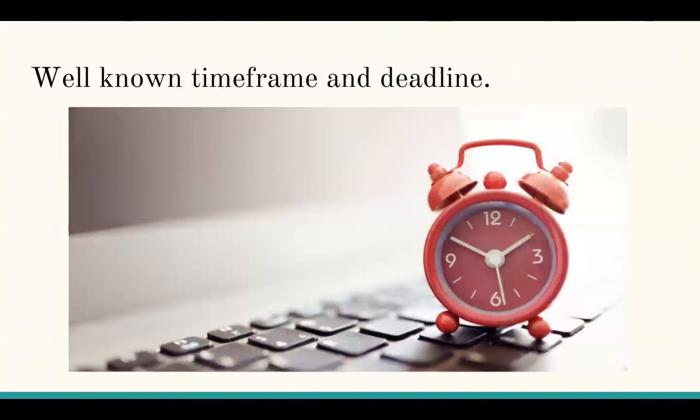There should be a limited number of change initiatives happening at the same time as well. There should just be a few. And the team should deliver on the change in incremental and iterative results on a regular cadence of 2 to 4 weeks, similar to a development team in how they work.